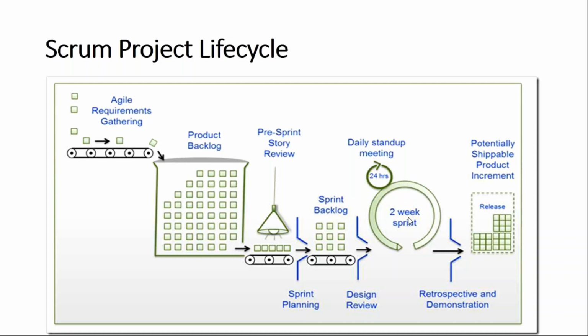In current CGI we have a few teams with a sprint duration of 4 weeks, almost a month, because their user stories are interdependent on various other lines of business and we cannot split them into smaller user stories. But typically, most projects run on a sprint duration of 2 to 3 weeks.